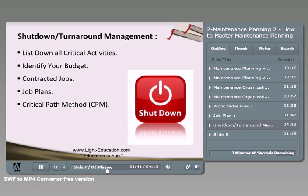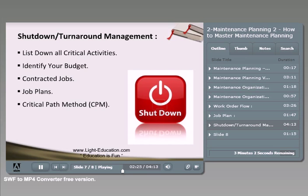We need to build clear job plans for all critical activities — this is very important and cannot be overlooked. Based on these job plans, we will determine the duration of the shutdown and ensure activities do not take longer than the right time. The last key element is the Critical Path Method, or CPM, a very important methodology for managing any project or small-scale project like a shutdown or maintenance activity.